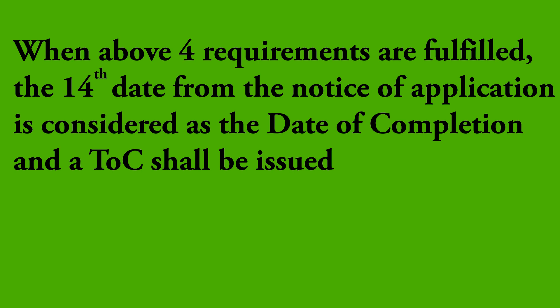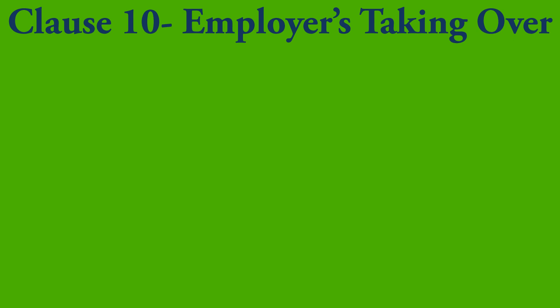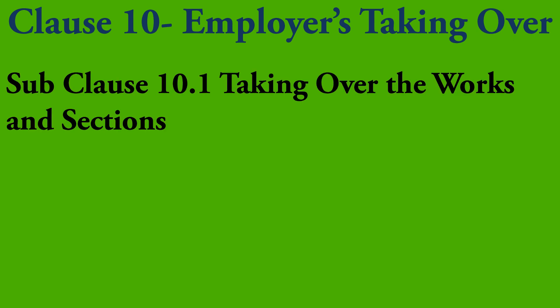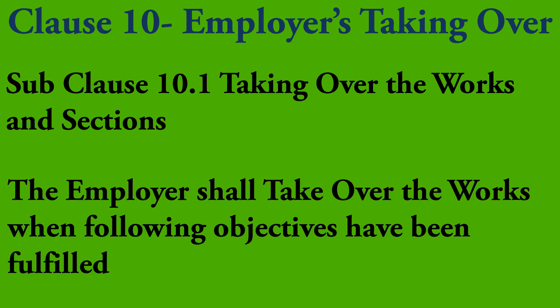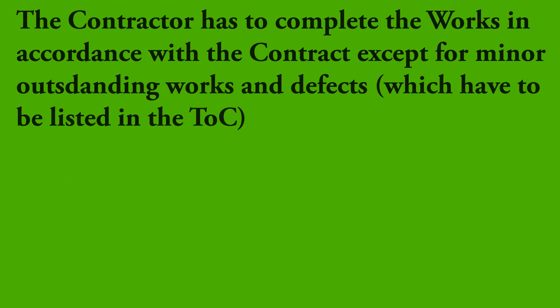There are a lot of details here, so we'll carefully go through the entire clause 10, Employer's Taking Over. Sub-clause 10.1, Taking Over the Works and Sections: the employer shall take over the works when all the following objectives are fulfilled. First, when the works have been completed in accordance with the contract, except for minor outstanding works and defects which will not substantially affect the safe use of the works or section for their intended purpose. These outstanding works and defects shall be listed in the TOC, and the taken-over works shall be safe to use until outstanding works are completed and defects are rectified.